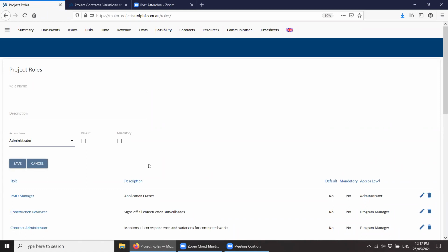They can put themselves on any deliverable, they can put themselves on any project, and they can timesheet to anything they like. They just want to reduce the resistance. So that's the complete no control methodology, right through to the thing that says you can only timesheet to projects that you're on, and you can only timesheet to deliverables you've been allocated to.